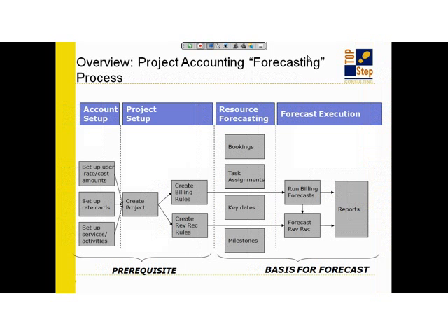So it looks for future time in most cases, and future time typically is tied to resource management or resource forecasting. Okay? So if you're the type of organization that hasn't quite bitten off that chunk of process, that resource management process, you may find yourself with limited capability to do forecasting because you need to know who's going to do what when or have an expectation.